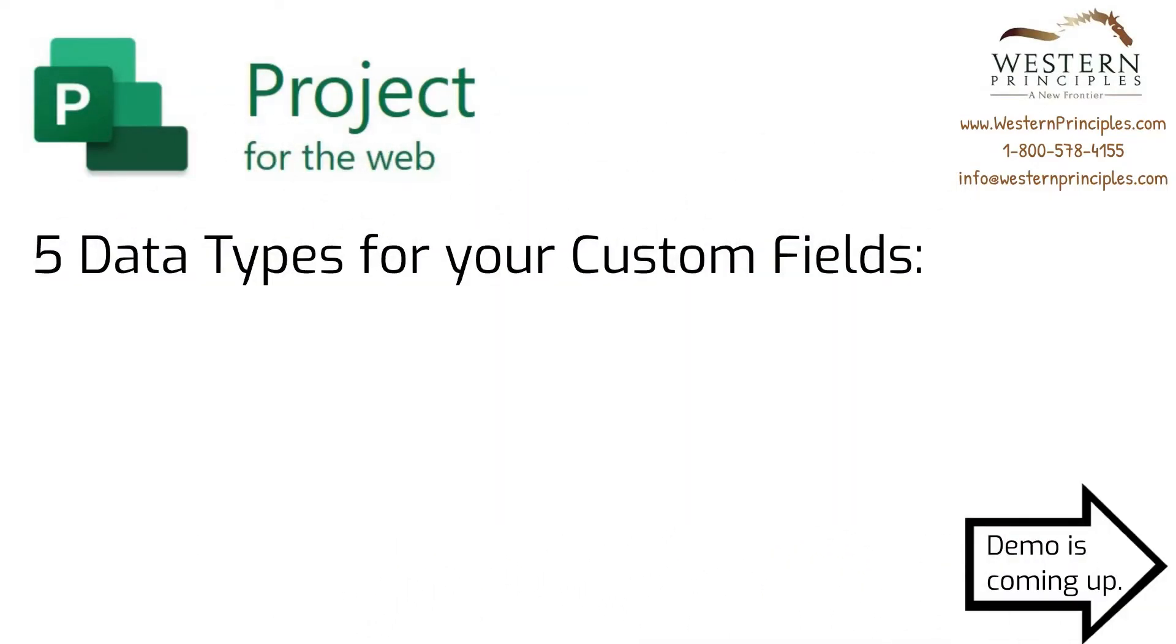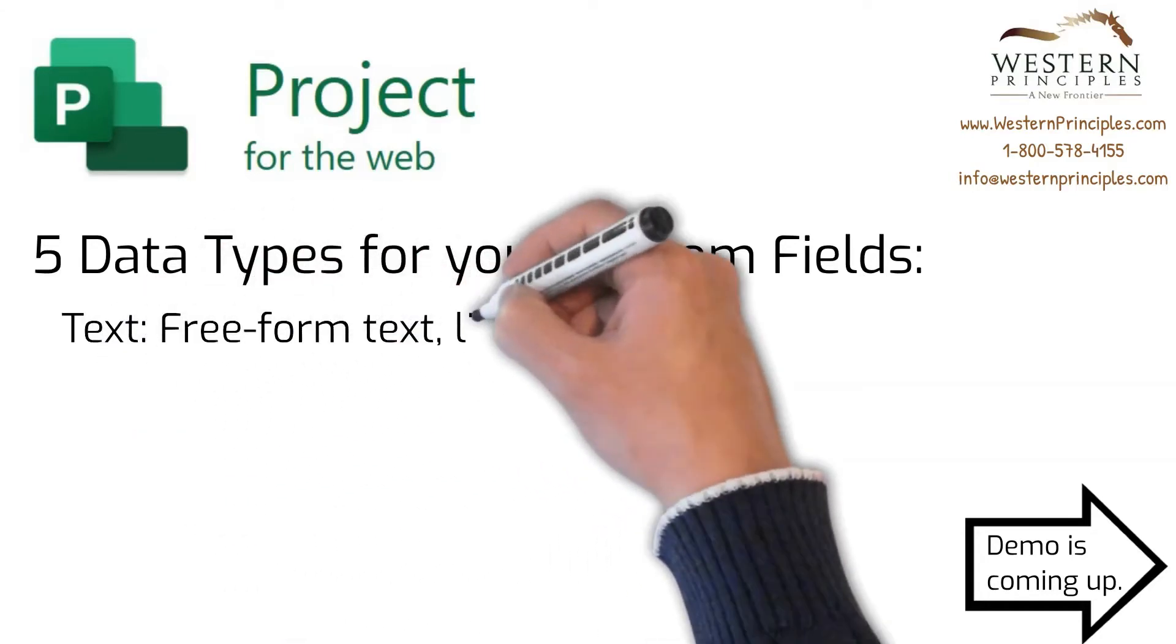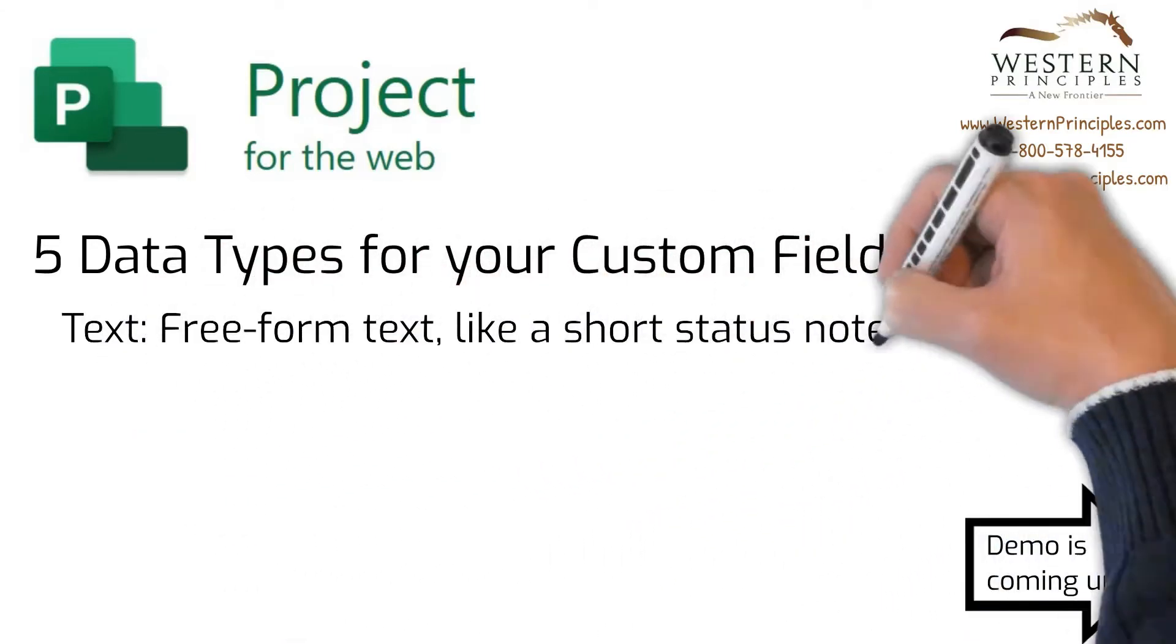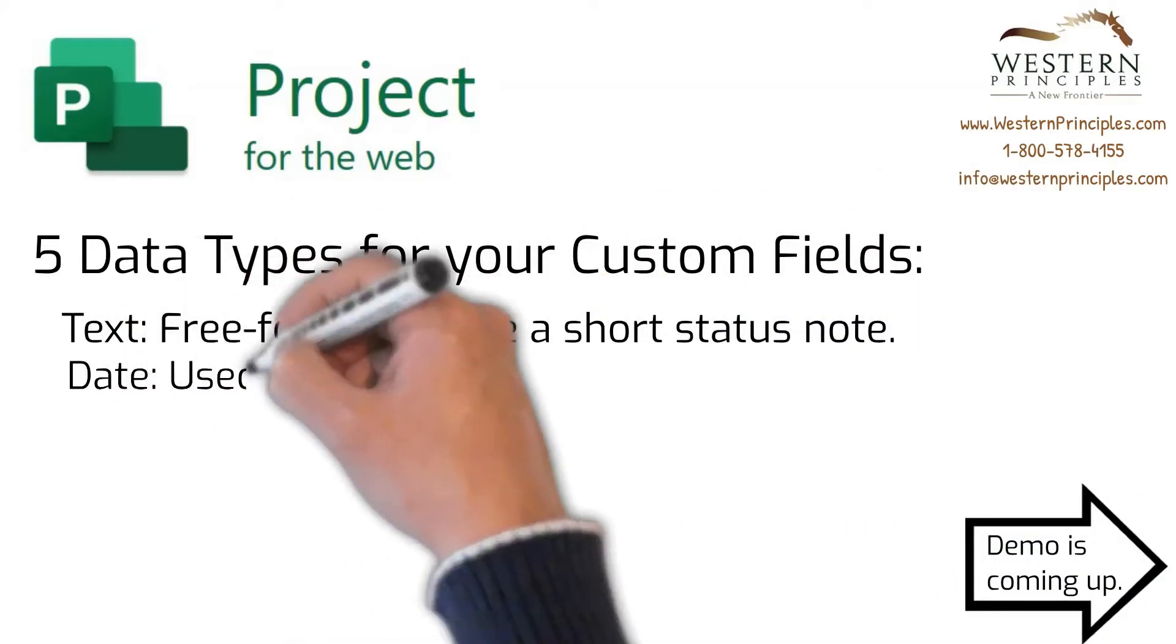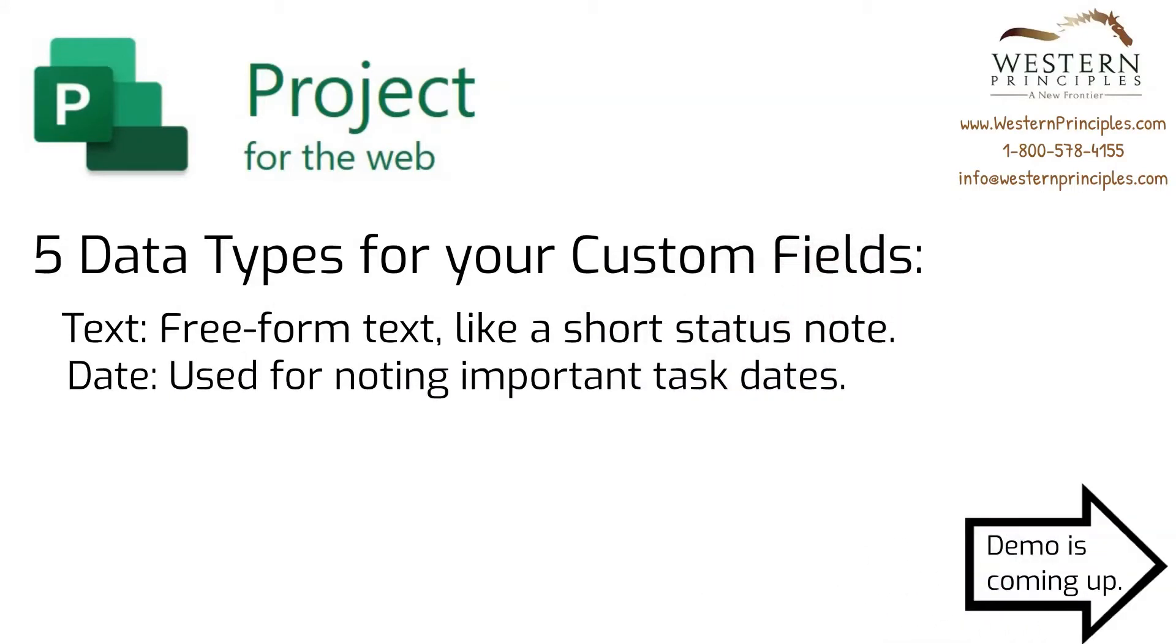Project for the Web provides five new custom fields. With the text field, you can enter free-form text, like a short status note. The date field can be used to track a task date, like the next date on which you plan to check the status of an activity, or maybe the date you need to procure items for the work.